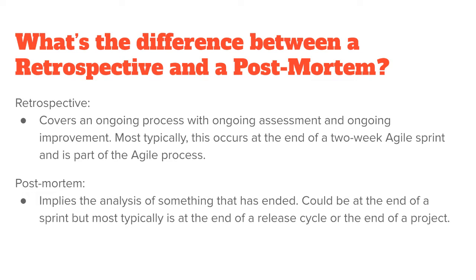So the retrospective, if you think about it, is how do we improve ourselves, right? How do we improve ourselves as a team in order to continue to be able to develop, to continue to be able to design, and to continue to develop efficient deployment. So that's the whole concept. Now, if you're a true Agile shop or Scrum shop, typically you'll do it every 2 weeks. But like we said at the beginning, it's up to the team.